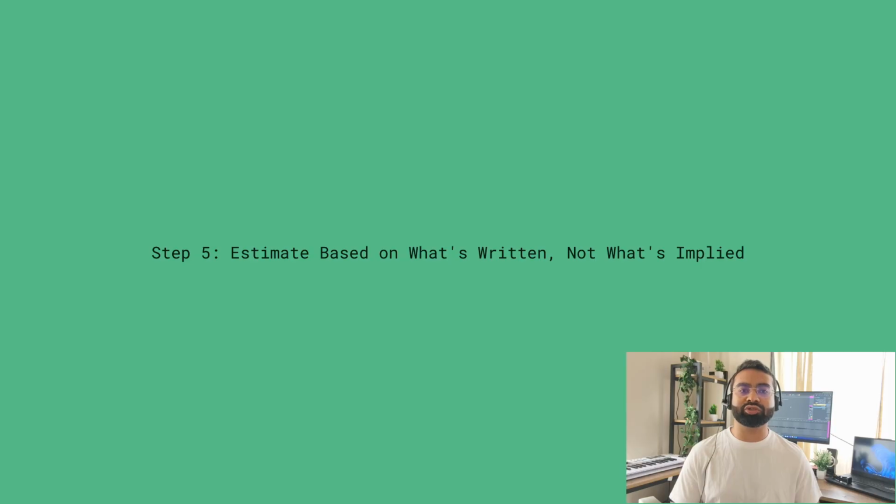Bid on what's written, then in your proposal, clarify assumptions. Our estimate of 40 hours assumes web-based dashboards, 5 concurrent users, daily refresh frequency. If requirements differ, we will adjust. That protects you and sets expectations.